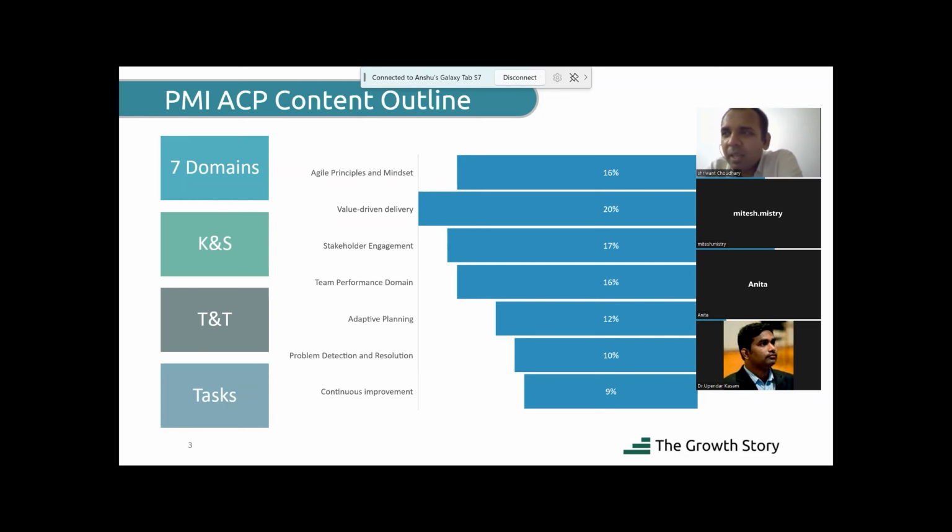Which means, when you say that it will take 2 hours, it may take 2 hours, 3 hours, 4 hours, maybe 1 hour, but you cannot say it will take 10 days. When you are estimating something to be 2 hours, it cannot take 10 days. But when you say the estimate of this is 2 story points, what is that story points? It's a relative estimate. Story points is a relative estimate.